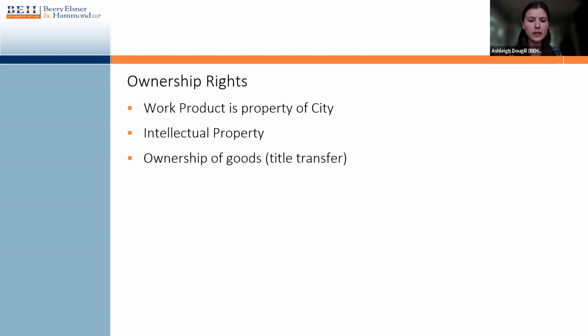If you recall my previous mention of FOB and CIF, that whole analysis is when title and risk transfer to the public entity. So check your agreement for what conditions there are on title transferring to you, and whether you have some sort of right to inspect the goods before the title transfers to you. That is very important in the context of goods.